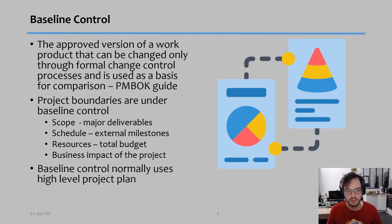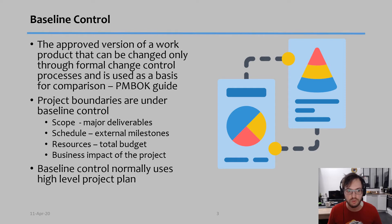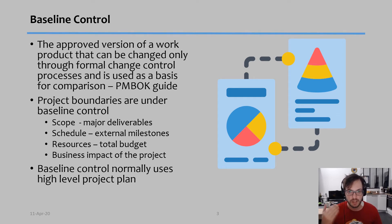One of the things we start with is to talk about our baseline plan — our original plan. Baseline control is the approved version of a work product that can be changed only through formal change control processes, and is used as a basis of comparison. This is our original plan and it's the one that we're going to compare our actual performance to, so it is a very important document.